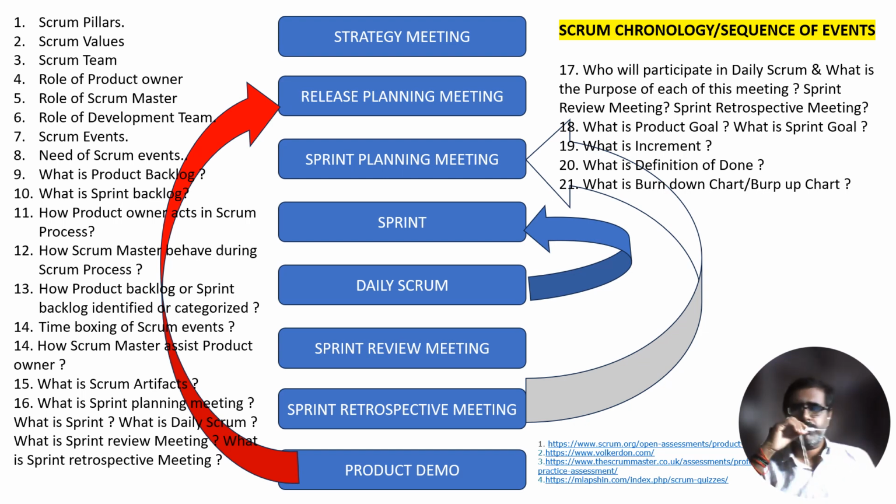This is an ongoing activity, right, to add details such as descriptions, order and size. Attributes often vary within the domain of work. The developers who will be doing the work are responsible for sizing. The product owner may influence the developers by helping them understand and select the trade-offs. So then we have the commitment, right, for the product goal.